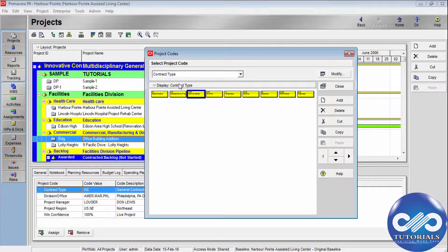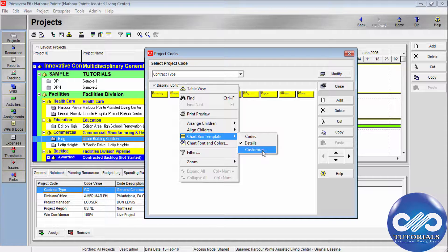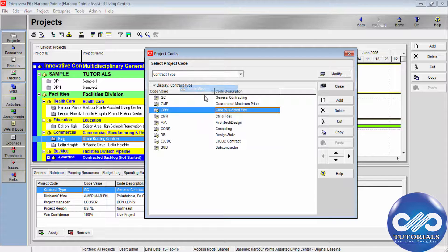If you would like to see the chart view, you can see it here. You can even customize this using the chart box template by clicking the Customize button and changing the view. Let's go to the table window. There is also a feature called weighted project codes. Weighted project codes enable you to rank or prioritize projects using a weight value.